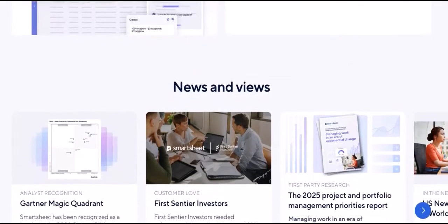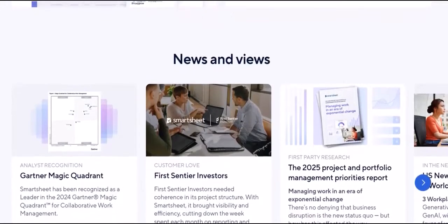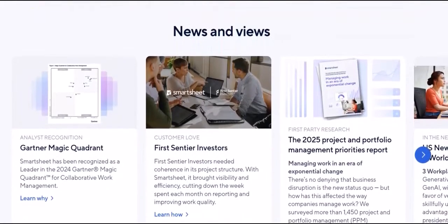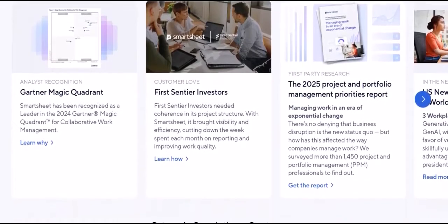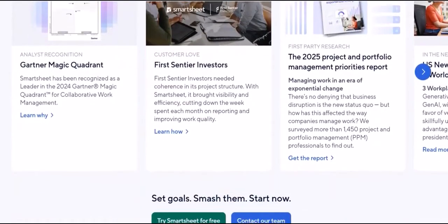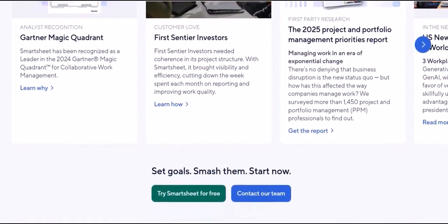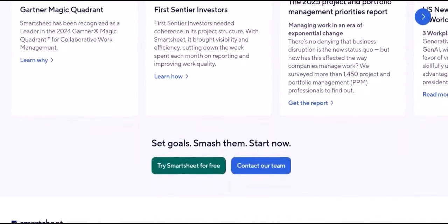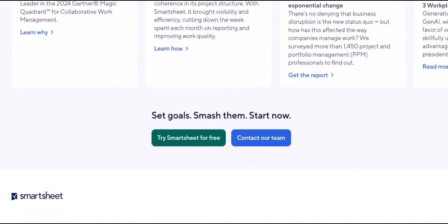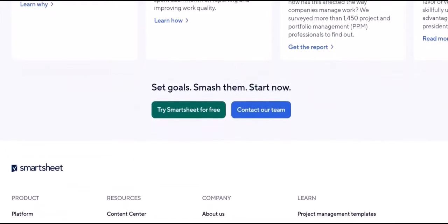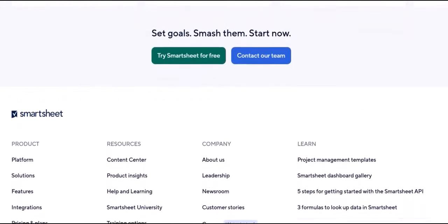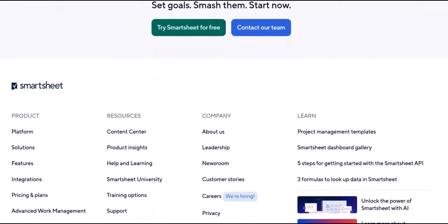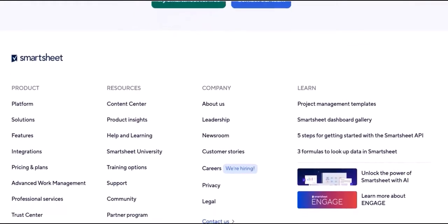1. The grid. Setting up your foundation. This is where Excel naturally shines. Start by structuring your sheet to mimic Smartsheet's familiar grid. Column headers. Dedicate the first row to clear, descriptive column headers. Think about the key data points for your projects and tasks. Task name. Assigned to. Start date. End date. Duration, days. Percent complete.